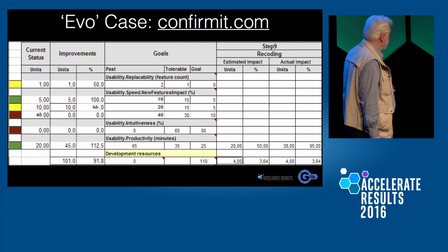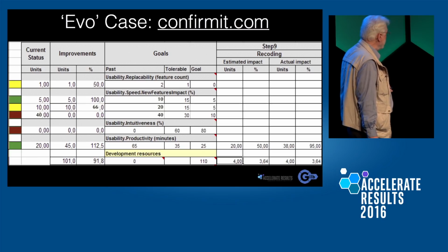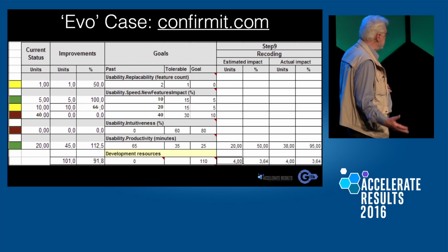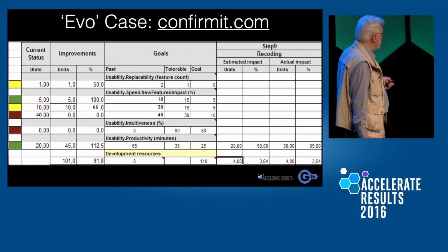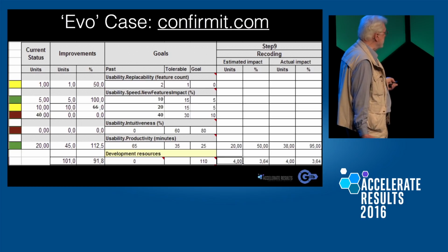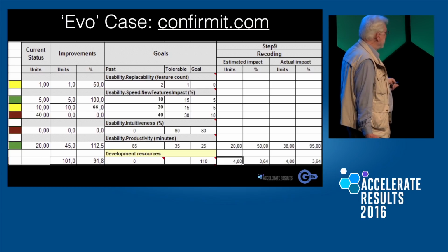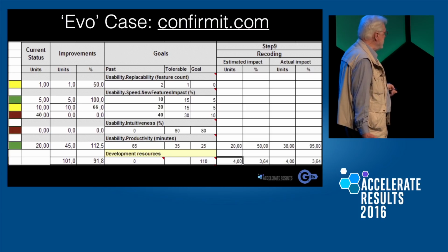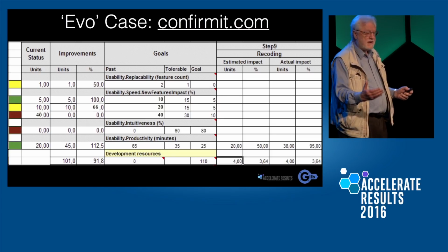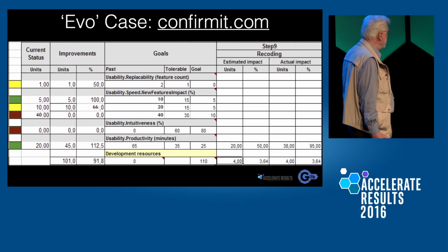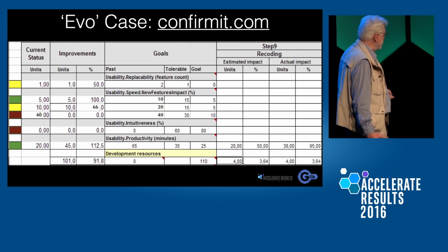We have to get delivering a market report in 65 minutes, which everybody's living with today, get that down to 25 minutes if we can. They looked at a half-hour stand-up meeting. They looked at about 12 design options. One was market information recoding. Every design option, they asked a very simple question: how many minutes are you going to save? We have to save 40 minutes here. This one, they estimated they'd save 20 minutes, which is 50% of the way to the goal. And that was the best design they had. And they reckoned they could do it in their time-boxed cycle of delivery, 4 days.